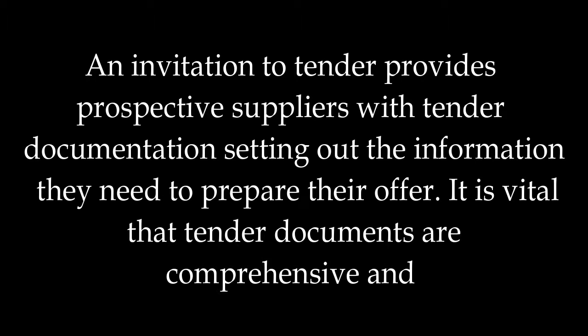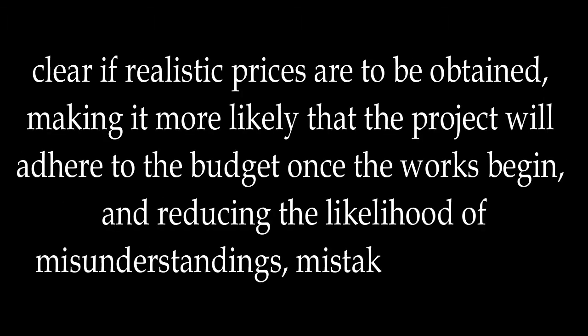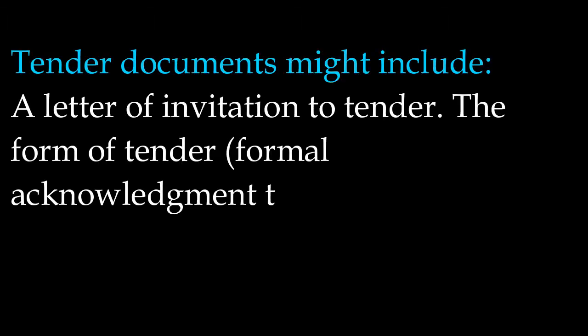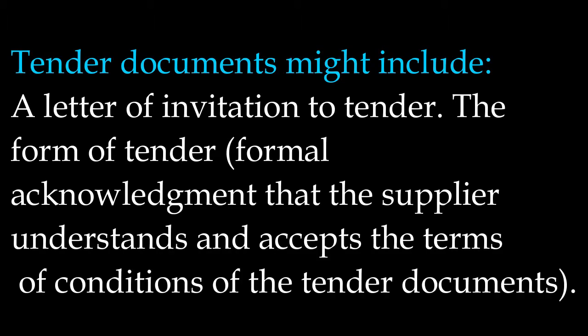It is vital that tender documents are comprehensive and clear if realistic prices are to be obtained, making it more likely that the project will adhere to the budget once the works begin, and reducing the likelihood of misunderstandings, mistakes and claims. Tender documents might include a letter of invitation to tender, the form of tender, formal acknowledgment that the supplier understands and accepts the terms and conditions of the tender documents.